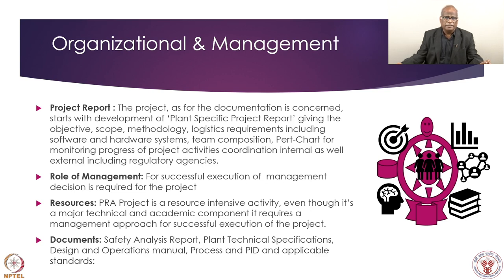Any PRA done needs a domain expert. That means suppose we are doing it for industry X, the industry X expert should be involved in the project directly or indirectly, because the as built, as operated aspect of the plant will get translated into the model only when domain experts are involved. Otherwise, our studies will be one thing and the plant operation and maintenance something different. Sometimes it happens that if we depend too much on generic data, then we are wondering whether it is for our plant. This is where the management aspect comes into the picture.